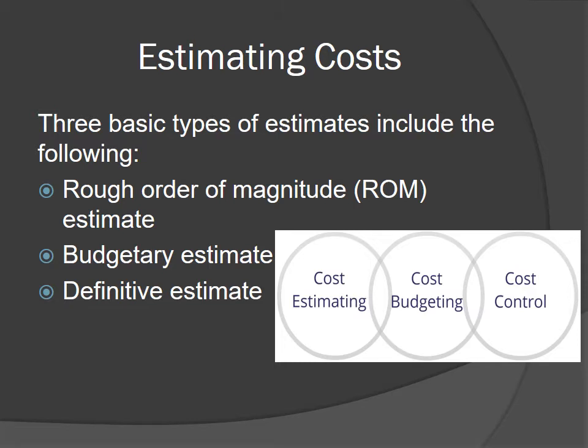Three-point estimates estimate the most likely, best case, and worst case costs for activity costs, then use an average or Monte Carlo simulation to produce the estimate. Parametric estimating uses a computer model to calculate estimations. Parameters entered in the model would be things such as the price per line of code or the cost per workstation.